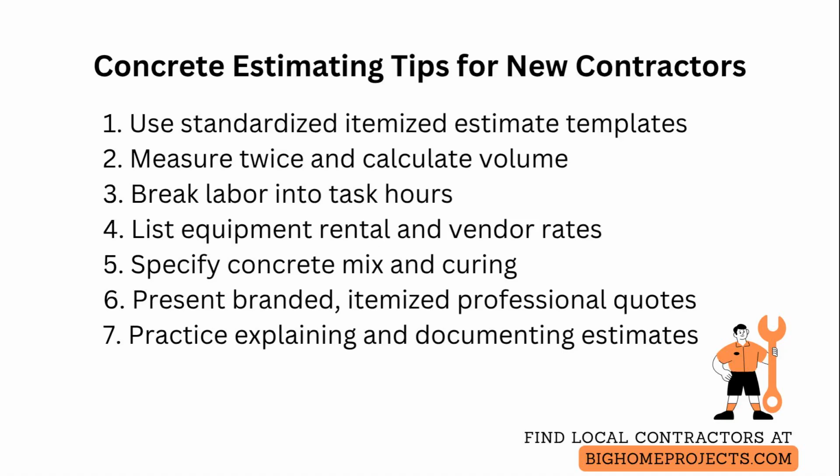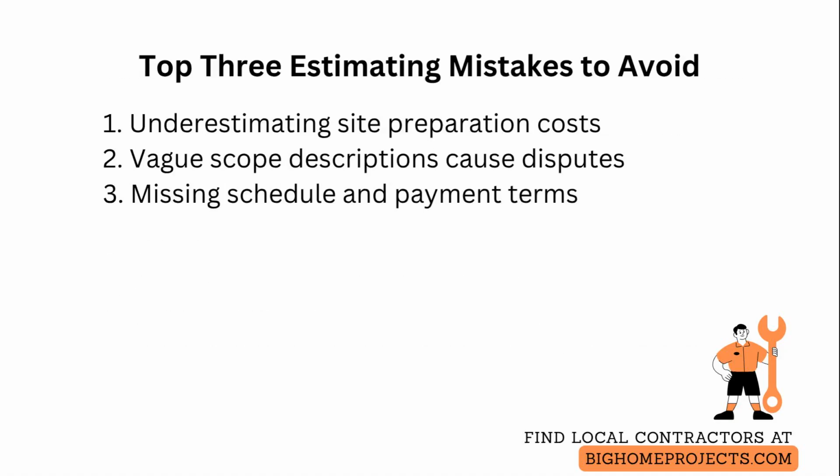Common mistakes include underestimating site preparation, which leads to unplanned excavation and higher costs. So always inspect or photograph the site. Allocate a specific allowance for unknowns, and state how additional work will be quoted.